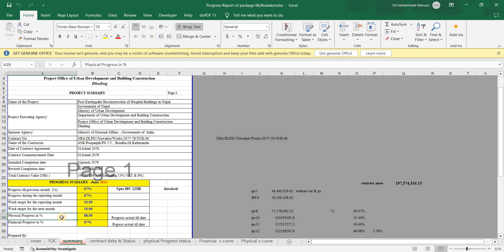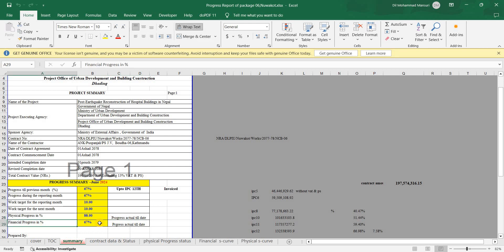For physical progress, suppose we have 88%. Physical progress is the actual work completed on site — for example, if you have cast 100 columns physically but payment has only been processed for 50, the physical progress for columns is 100% while financial progress is only 50%. So here we have financial progress at 67% but physical progress at 88%, because payment from the consultant is still pending.